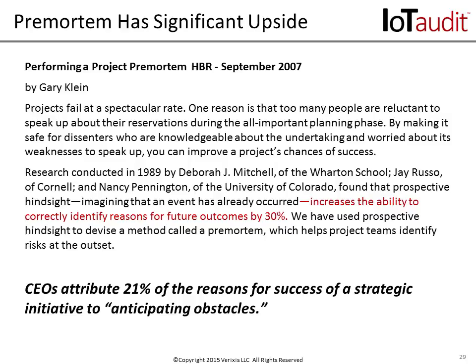And the reason is many people are reluctant to speak up about their reservations during the all-important planning phase. By making it safe for dissenters who are knowledgeable about the undertaking and worried about its weaknesses to speak up, you can improve a project's chances of success.